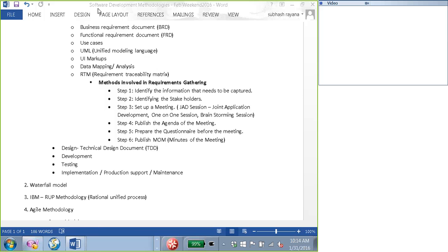The timing required for the technical architecture team to finish their design is in the project plan, which predefines the amount of work involved, when they start the design and when they end it. So I would go with the project plan, make sure expectations are set correctly, and follow those timelines.